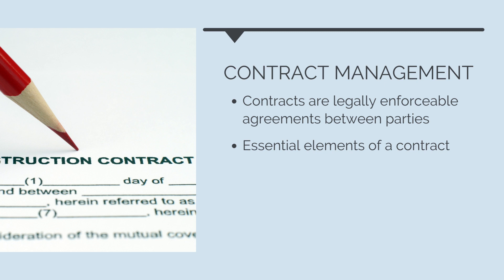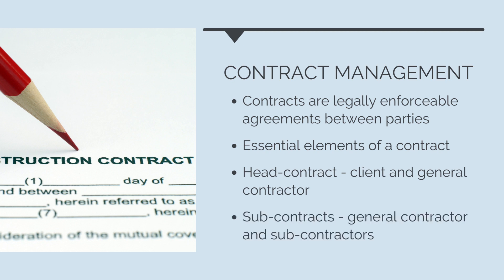To effectively use construction contracts, we need to understand the essential elements of a contract. The two key types of contracts we deal with are the head contract, which is the contract between the client and the general contractor, and subcontracts, the contracts between us and our supply chain.